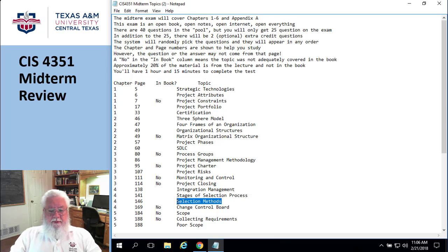Let's continue. The next one talks about the change control board. And so changes, maintaining changes, monitoring changes, recording changes, that's very, very important for lots of reasons. Okay. So one is make sure you don't forget something. That's very important. If somebody asks you to do something and you didn't write it down and then you didn't end up doing it, they're going to be highly upset. The other is, okay, I said it was going to cost $1 million, but it ended up costing $1.5 million. But before you fuss at me, look at all these approved changes that you made.